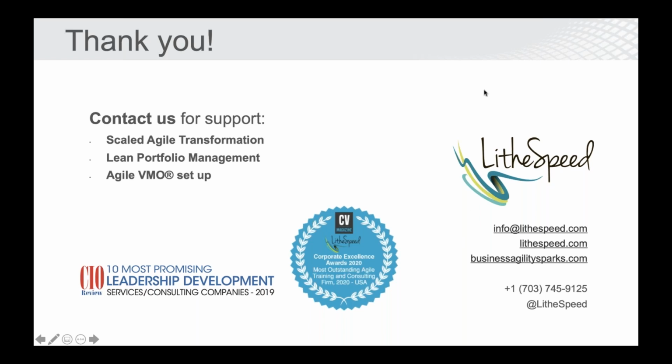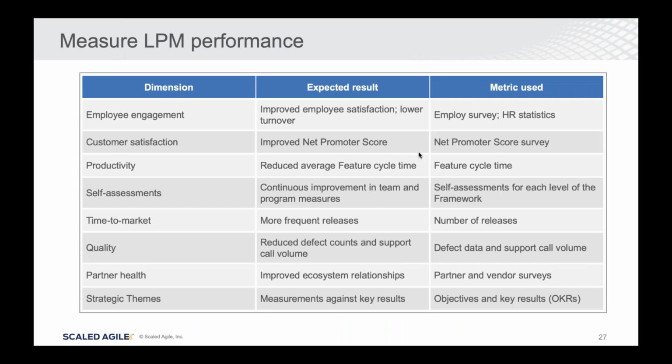Yeah, I totally like that idea of saying, hey, the problems that we're facing are changing. And frankly, I worked with one organization years ago that had an enormous technical debt. They had a backlog of bugs. A new CIO joined the company. When they got there, they cracked open the covers and really found what was going on, which was no investment in technical debt reduction or bug fixing for a number of years. They inherited quite a substantial problem. And so they did the right thing. They said, look, we're going to put a bug burn train together. It's a small train, but nonetheless, it was an actual train. We're going to put 5 teams on bug burn, and we're just going to burn off bugs.